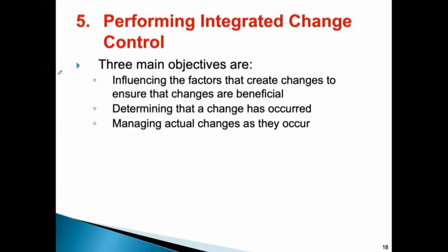Managing actual changes as they occur, these two points are the same. You should also manage the changes. Managing is again getting the approvals and revising the documents and plans, and after approving, you have to update all the relevant plans and documents of the project, so that you always stay on top of the work.